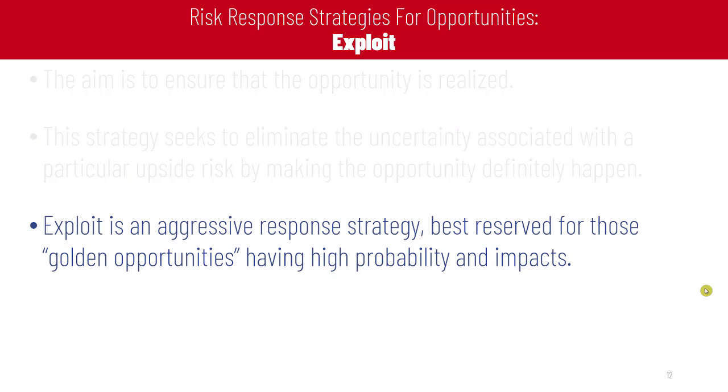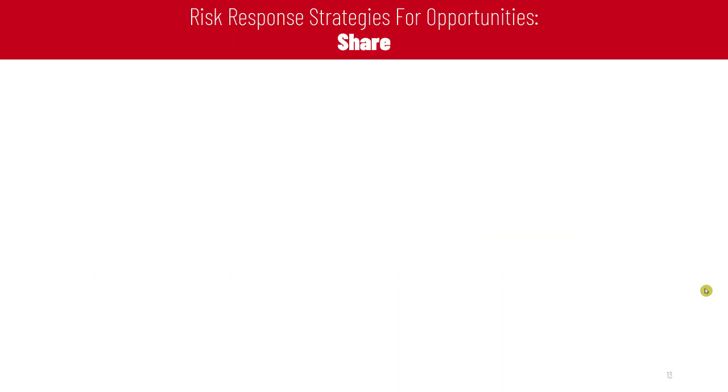Exploit is an aggressive response strategy best reserved for those golden opportunities. We will not use exploit for all the opportunities we have, but we will only reserve it for golden opportunities having a high probability and impact for occurring.